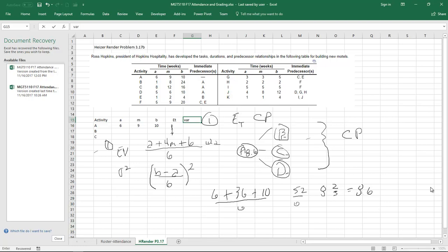Okay, and that's the longest path through here, and what you're going to find out is the expected value of the time through the entire network is your critical path, and they might be these odd numbers like 8.6, etc. All right, so we're no longer necessarily using just the predicted round numbers that we've been using so far. Now we're going to use the critical path, and we're going to add those numbers up.